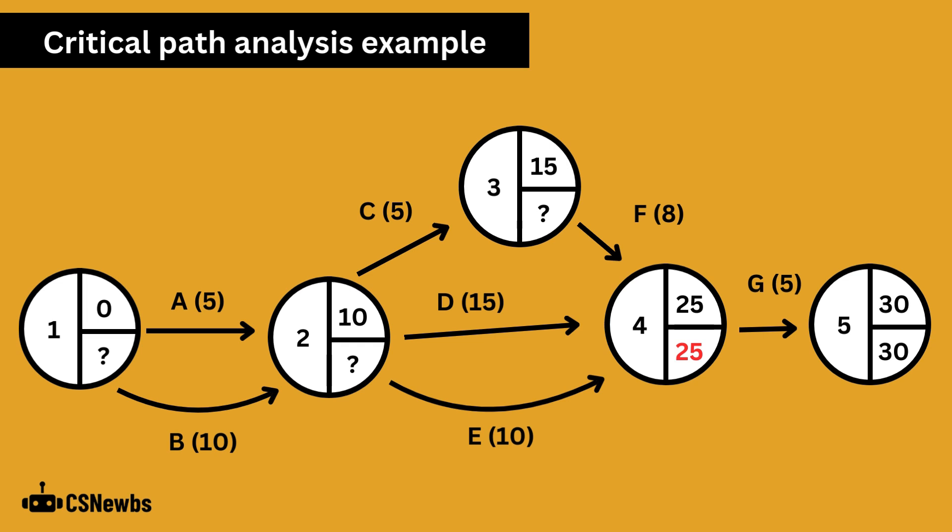Each time we take the largest time away from the latest finish time. There's only one activity between nodes 5 and 4, so 30 minus G's five days gives 25 days.